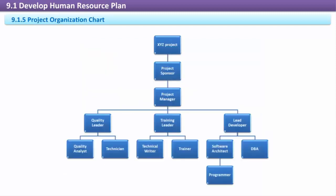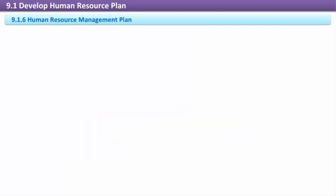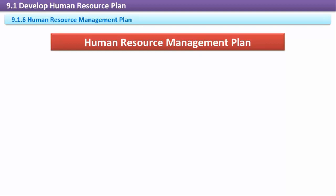Project Organization Chart: The Project Organization Chart presents the project roles and their reporting relationships, giving a visual or textual outline of the reporting relationships and hierarchy of the project staffing organization. As staff members are assigned to the project, the chart will be updated to reflect specific names next to the role assignments. Human Resource Management Plan: The Human Resource Management Plan and its component the staffing management plan together describe how the project will be staffed, and how the project team will be trained, evaluated, compensated, rewarded, and released from the project. The Human Resource Management Plan undergoes changes throughout the project since reporting and planning relationships may change, resource needs may change as activity definitions become clearer, or scheduling changes impact when roles are needed.